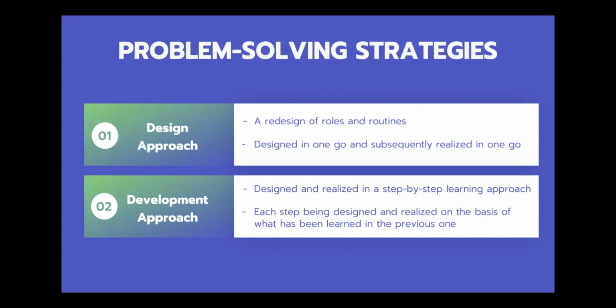you can basically know that it is to redesign roles and routines, design one goal, and subsequently realize it in one go. So you plan everything before you actually do it. And the second is the development approach, which means that you do it step by step. So the basic difference between the two is that with the design approach, you learn before doing, and with the development approach, you learn by doing.